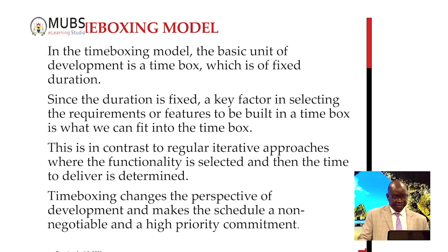Since the duration is fixed, a key factor in selecting the requirements or features to be built in a time box is what we can fit in that time box. This is in contrast to regular iterative approaches, where the functionality is selected and then the time is allocated to deliver that.